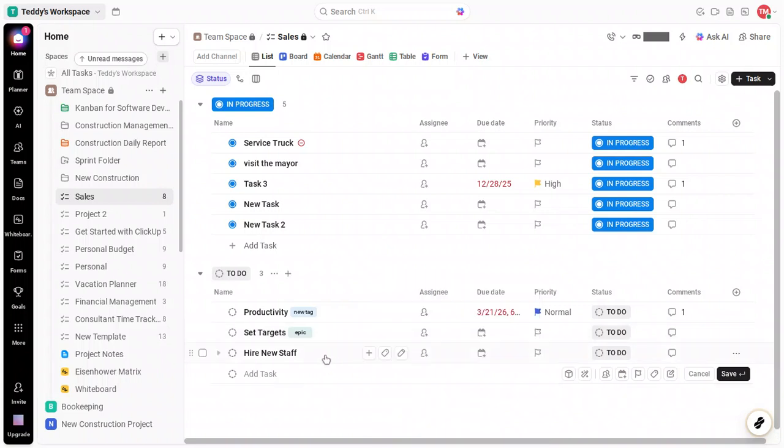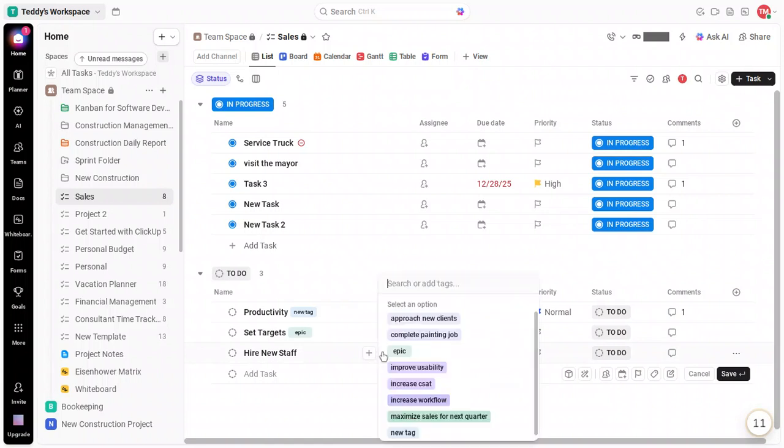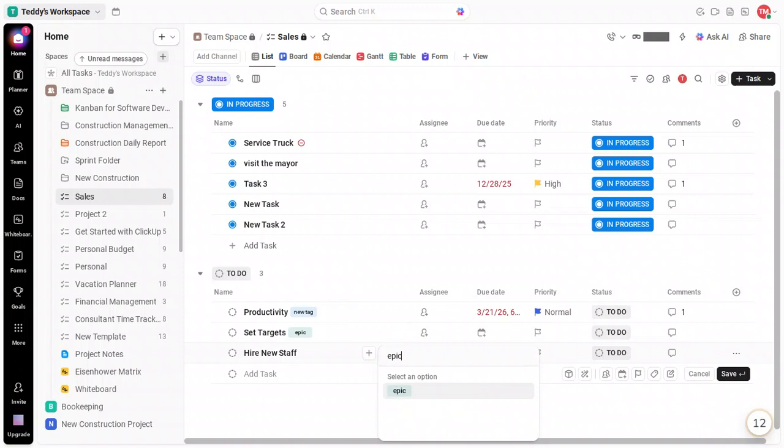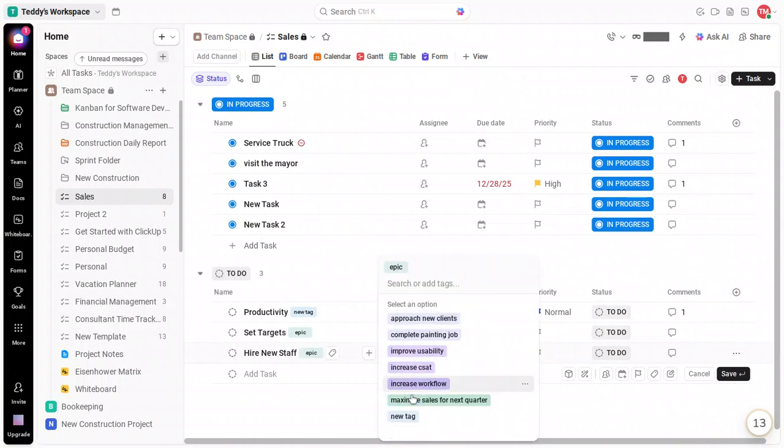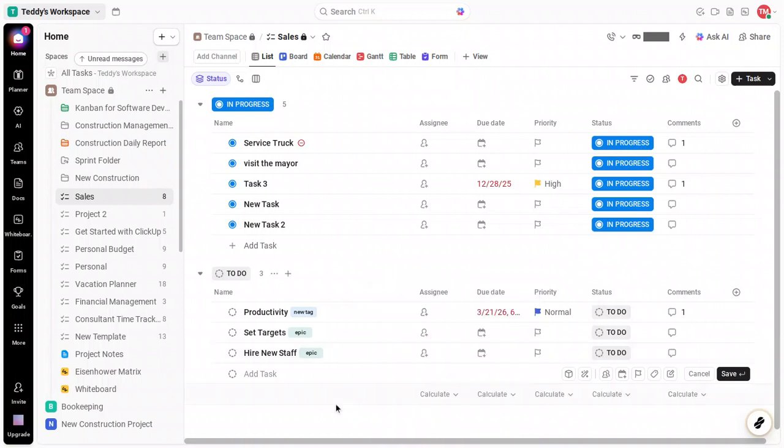It's time to outline the work. Click Add Task to create your first task. Write task titles that describe the outcome, not just the activity. Outcome-based titles make progress easier to measure and help everyone understand what done looks like. For example, "users can register and sign in with email and password" is more useful than "build login form." Save the task, then open its details so we can enrich it.